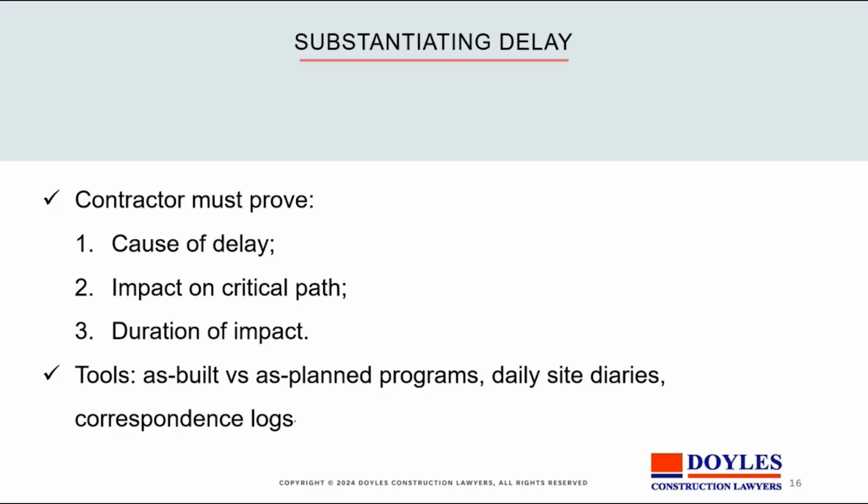If you try and describe the extent of flooding in 4 weeks' time, then it'll clearly be contended that you've embellished the flood. Whereas if you take the evidence at the time and you make sure that everything's observed and recorded, you're likely to have a better result.